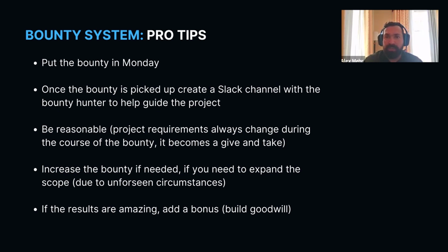Once a bounty is picked up, we create a Slack channel for that bounty with the name of the person who picked it up, the amount of the bounty, the deadline, and then inside that Slack is communication between the infrastructure team that I'm going to cover in a second.